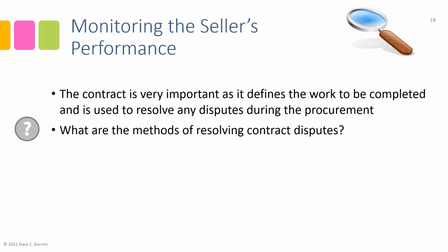That is some resolution that is done between buyer and seller without anyone getting involved. It can, if needed, go to mediation, which involves a mediator, and the mediator just helps bring the two parties together. It's like a third party that will advise each group, try to come up with a solution with the two parties, but doesn't have the ability to enforce a solution.